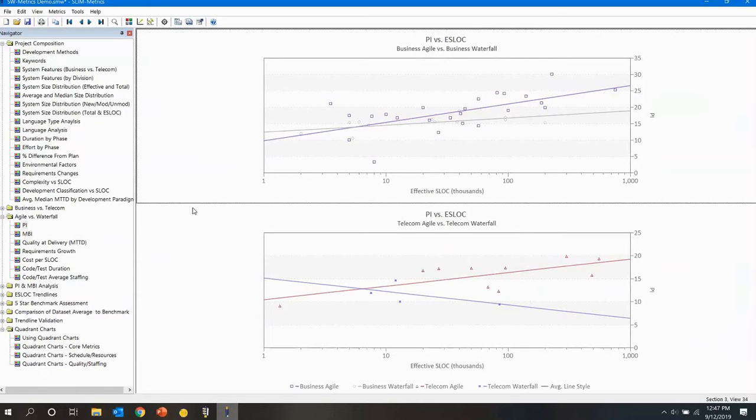Another question we have is what do you mean by Slim having a predictive model or having predictive models? In a couple of ways that I have shown, the trend lines, like you're seeing here, show patterns of performance that are often consistent for different project types. So like the Agile and the business groups here, we see different performance. And so those trends will help you see when assumptions are inconsistent, right? So we're using the trends a lot in the calculations, and therefore predicting what your typical behavior is going to be. So just using the trend lines as a source of assumptions is one way.